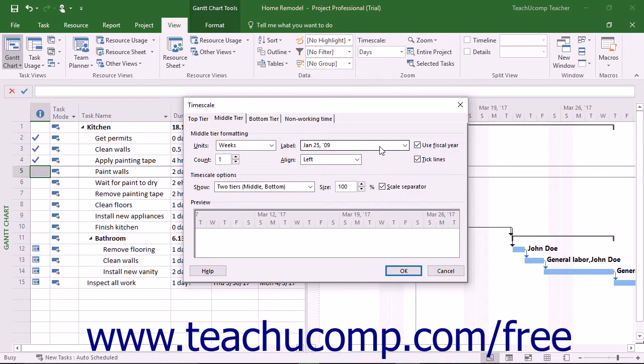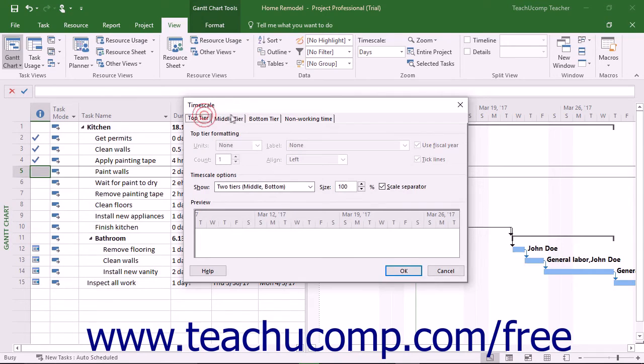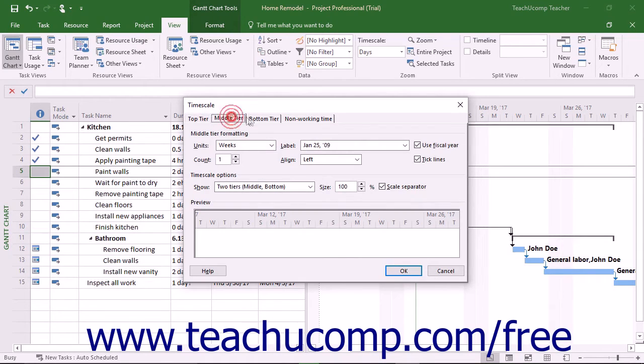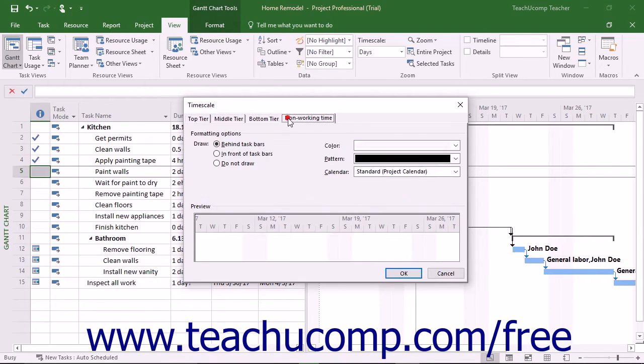There are four tabs within the Time Scale dialog box that appears: Top Tier, Middle Tier, Bottom Tier, and Non-Working Time.